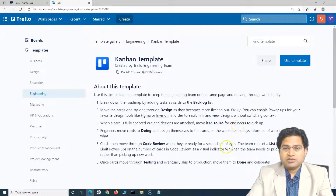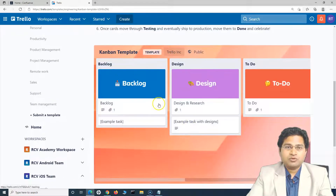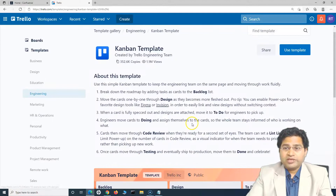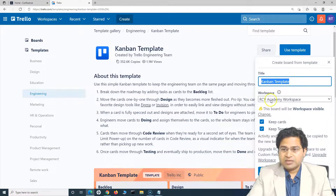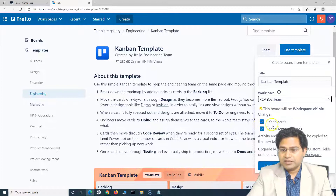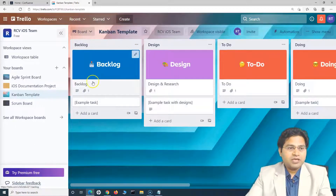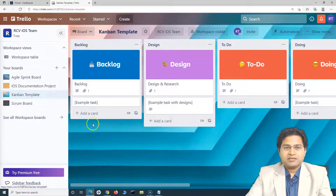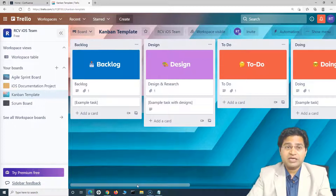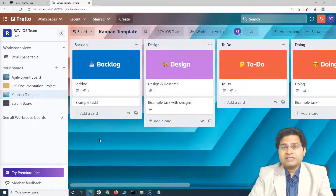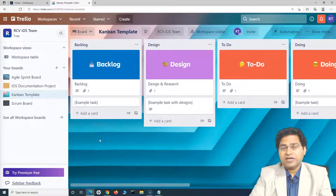This is a really good template that will help you churn out work quickly and be effective for your teams. Click 'Use Template', name it 'Kanban Template', choose the iOS workspace, keep the cards and template card, and create the board. Overall, scrum and Kanban boards share similarities, but in scrum we follow time-bound sprints — typically two weeks — with a fixed set of requirements to deliver in a specific timeframe.